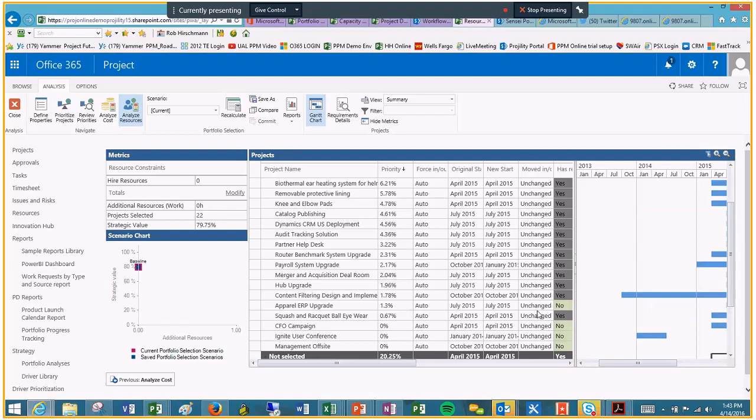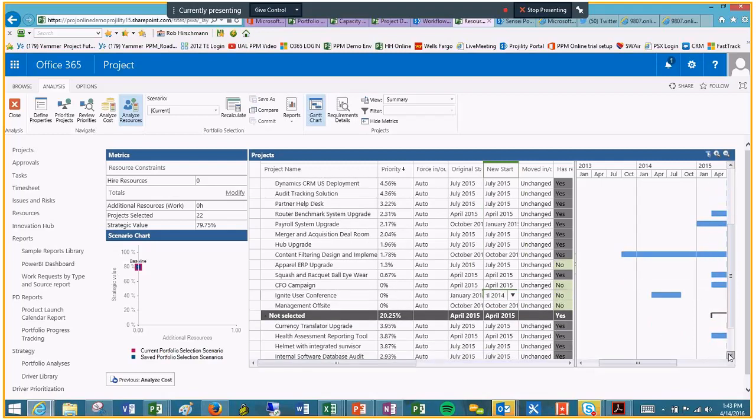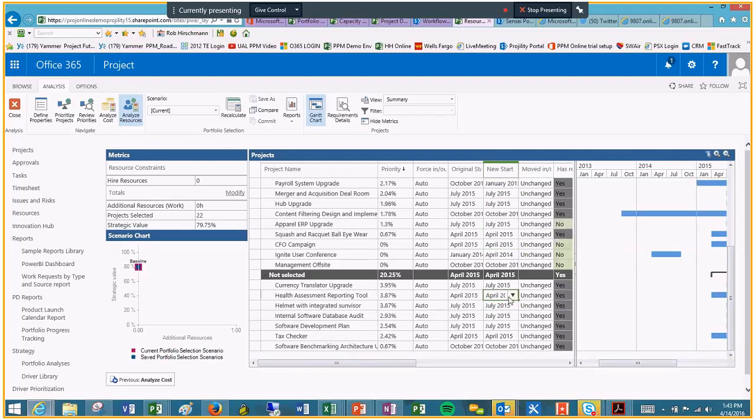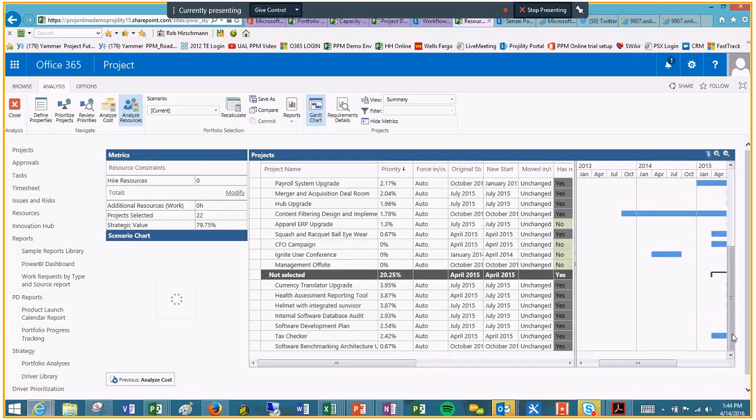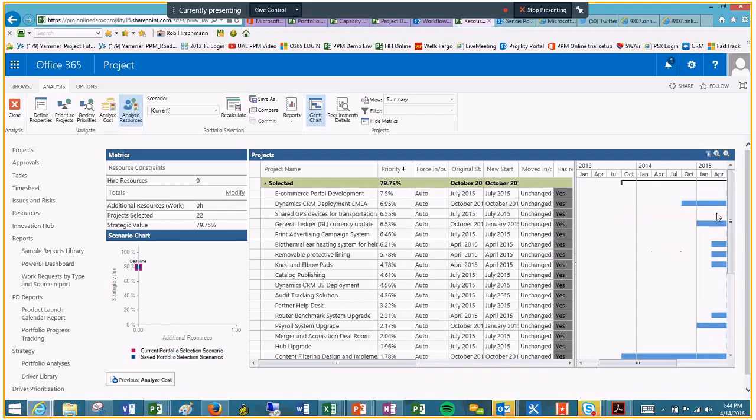Okay, well maybe we want to take a January project and move it out to April. So I'm going to shift the project out a couple months, but maybe, I know you really want to do this health assessment project, what if we push that one out to July? So we can start to run the scenario of delaying work with the same pool of resources, given the fact that we can't add resources, to see in that situation, can we change things?